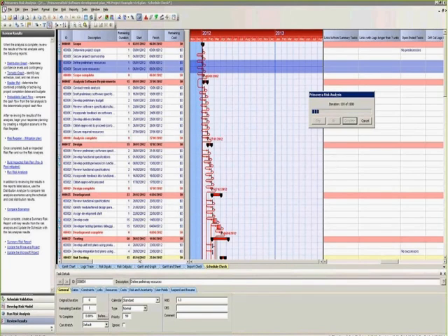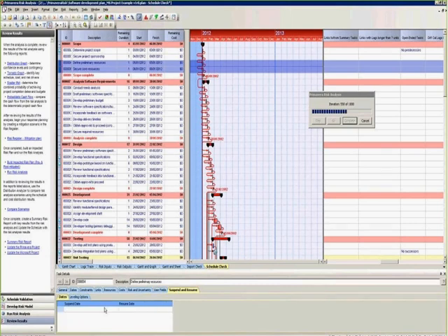While we do that, let's talk about some of the things that you can set for each one of these tasks. By the way, you can see how the schedule is getting updated and it moves. So you can deal with dates, constraints, links, resources, costs, uncertainty, and you can even suspend and resume tasks. So you can create conditional branches. So what happens if it rains? Will the crew be working on the roof or will they be working on the foundation, to use a crude example? There are a lot of things that you can do with that.